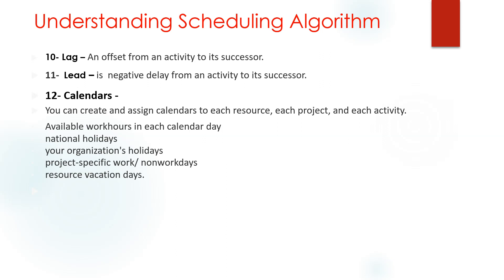Calendars — we have explained calendars in one of our lectures. How to assign a calendar to a resource or to an activity. This calendar lets you identify the working hours, national holidays, non-working days, and resource vacations. If you have an important resource like an expert who comes for one month every year, you can create a specific calendar for this person.